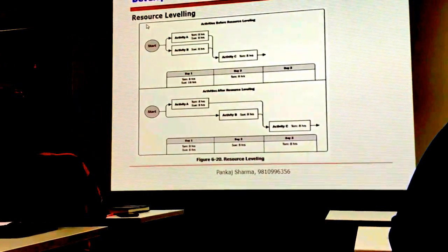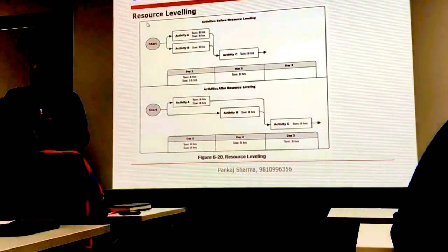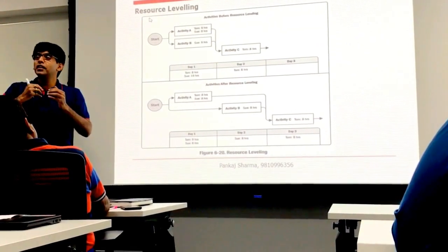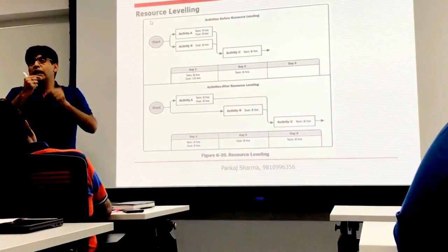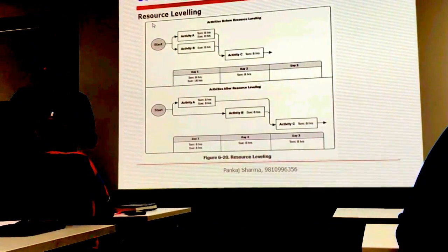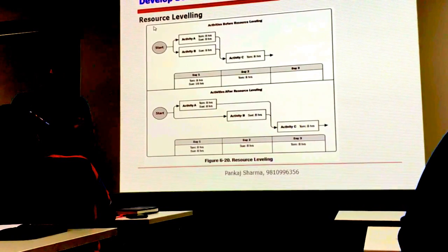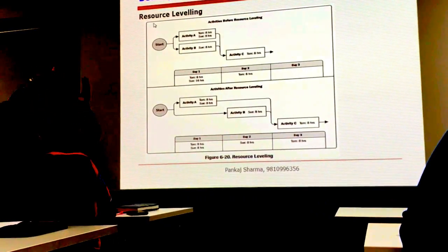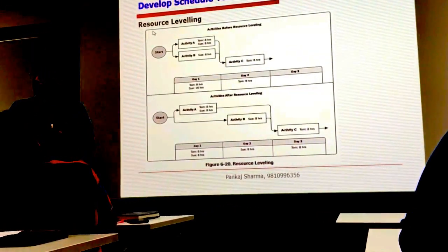Generally, whenever you use smoothing as a technique, we are not able to optimize the resource completely. We may do some activities in parallel. We can add some resources from the non-critical path to the critical path. But again, whenever I am doing smoothing to optimize, I have to work within the boundaries of the critical path. My critical path is not changed in case of smoothing.